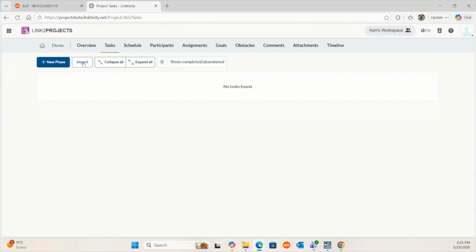So for us, our hosting department repeats 90% of the same steps over and over again when onboarding a new customer to the cloud. A project planner that allows them to quickly import these steps into a new project and then add or subtract relevant parts is naturally going to save them a lot of time, and more importantly, avoid missing crucial steps.